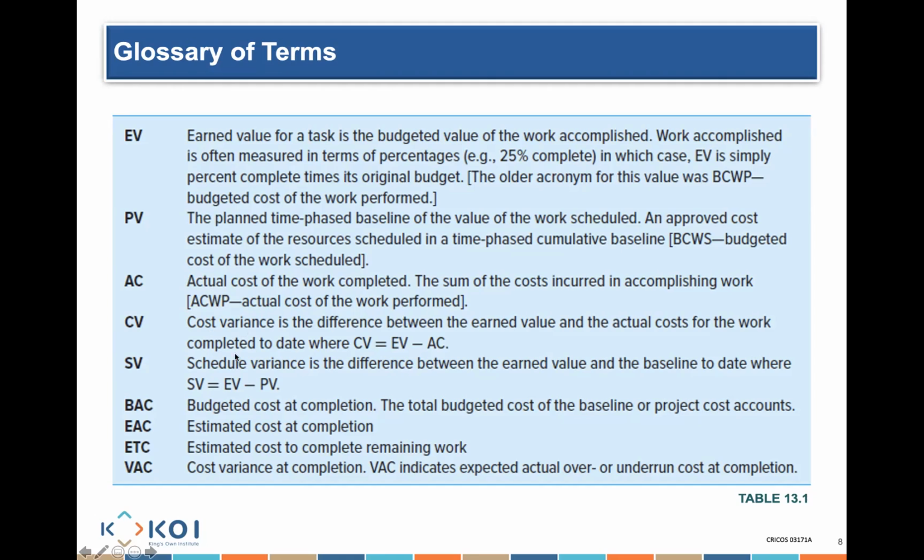But if I'm talking earned value minus planned value, which is this minus that, I'm just simply asking, am I ahead of schedule or am I actually behind schedule? So these are very, very simple ways. It's very easy. We're comparing earned value to planned value and earned value to my actual cost, which give me cost variance and schedule variance.